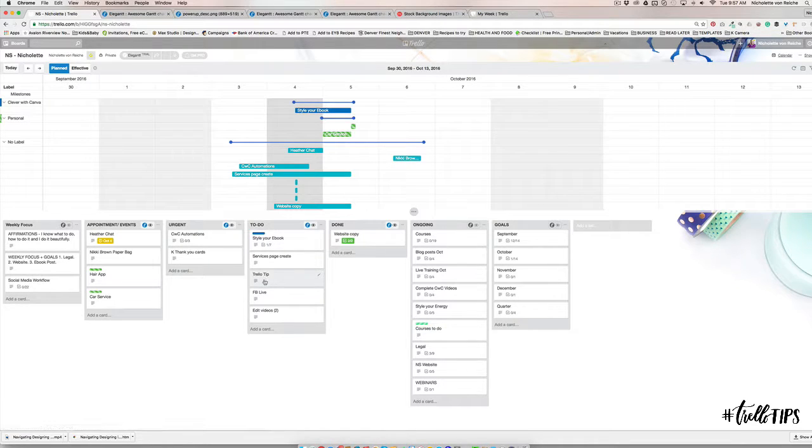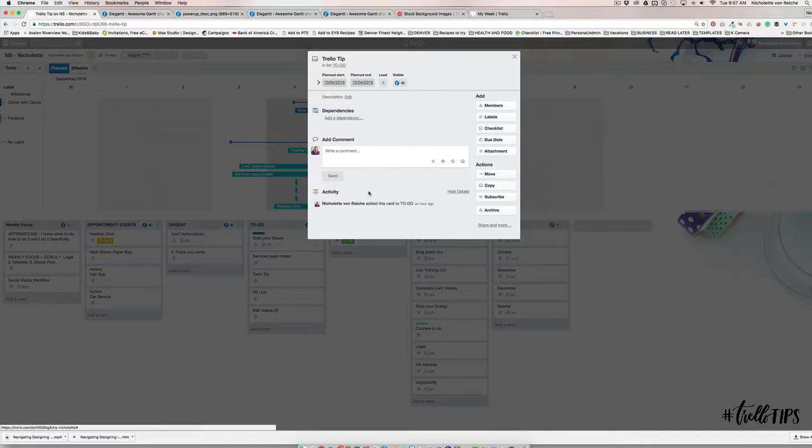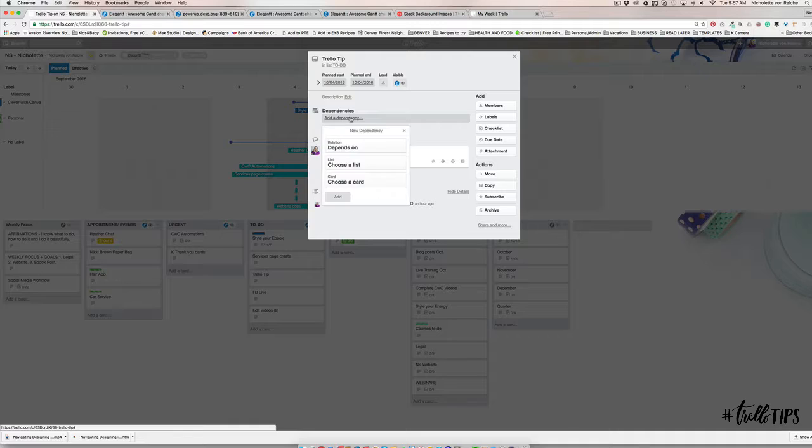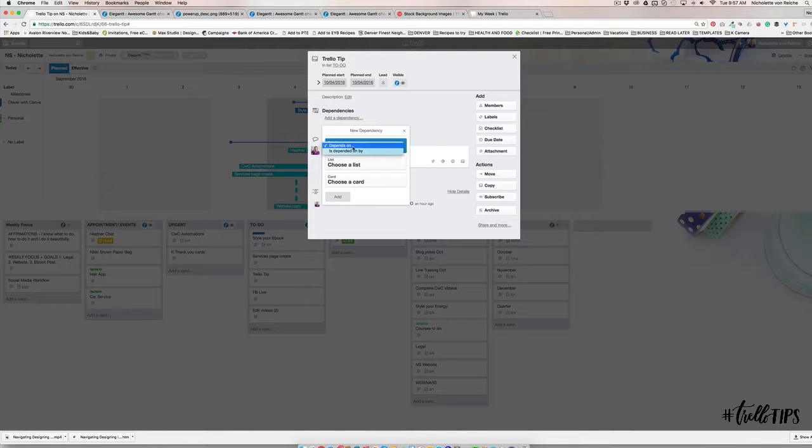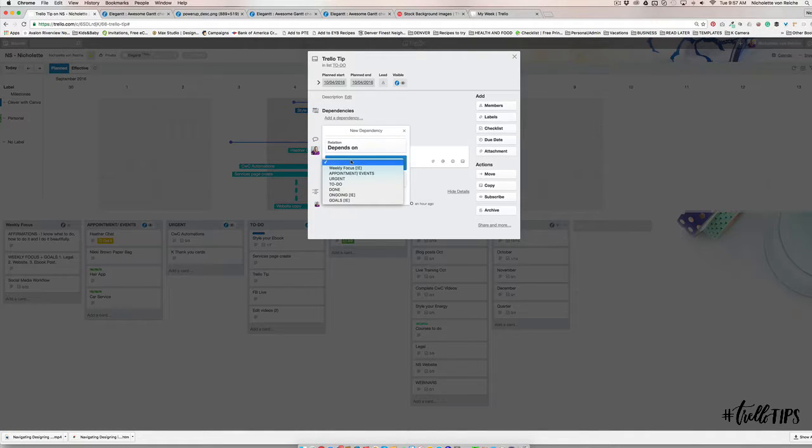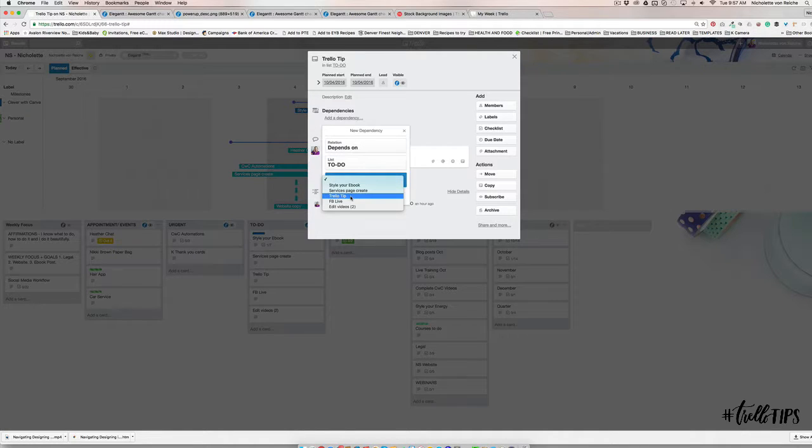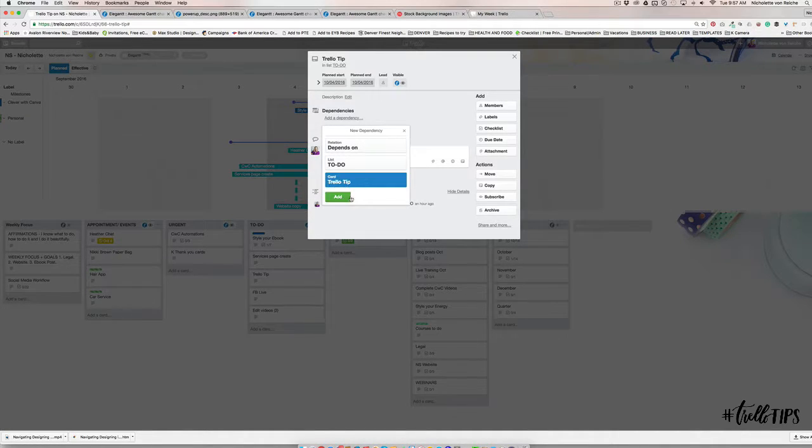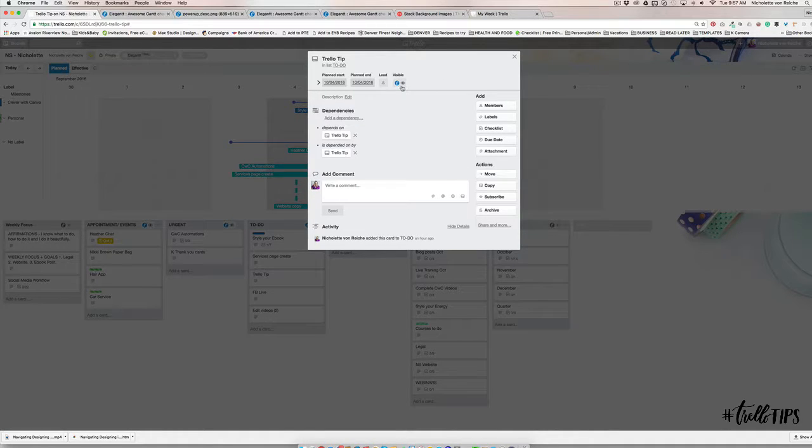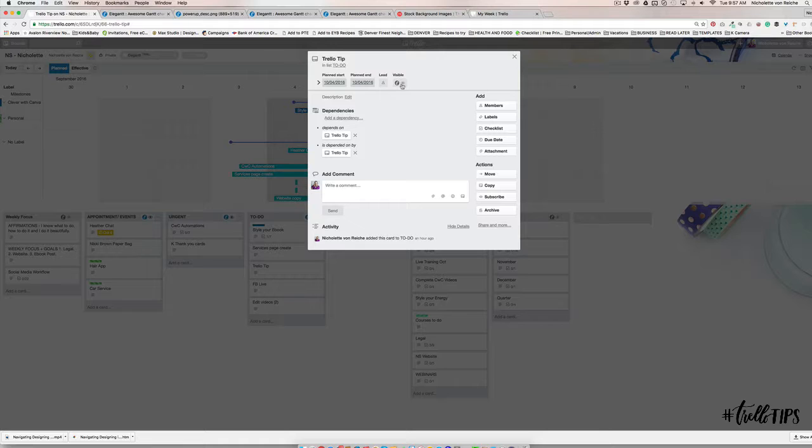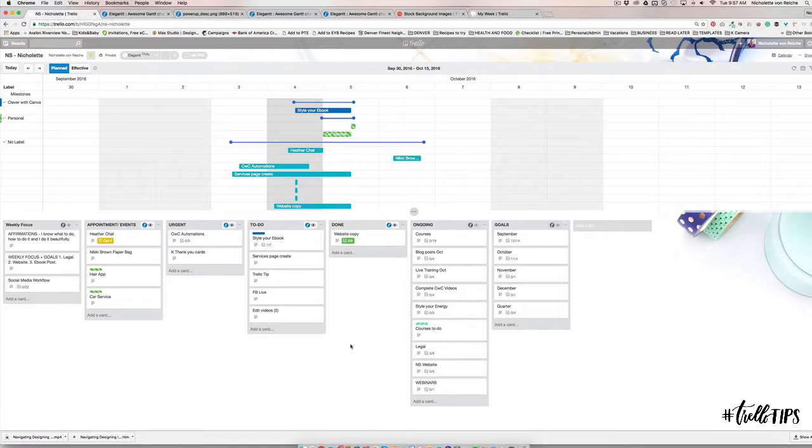If you have cards, what you can say is that - say for instance I'm creating my Trello tip and then my Facebook live is going to be dependent on me getting that task done - so you can say this is dependent on, in my to-do, getting my Trello tip done.